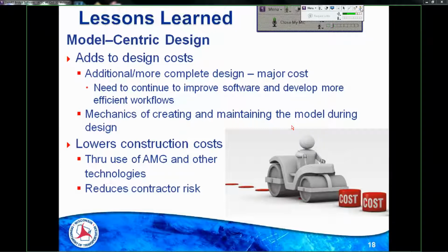The contractor contractually must deliver the project according to the contract documents, which is the plan. So some contractors, the majority of contractors that we talk to, are going to invest in some quality control, checking the design model information. They believe it's going to be less work to do that than it is to reverse engineer models completely from plan sets like they have been before these deliveries started. They think it's a net gain.